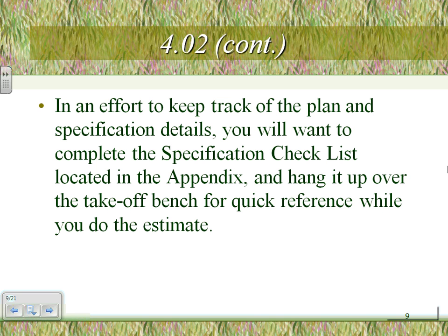Then you pick up the phone, call Michelle Cooley Erickson, and call Nick, the engineer on the project, and say, Nick, could you please clarify 1, 2, 3, 4, 5 about the specs and the blueprints? You look like you're a professional. The best way of using your time, instead of every time you read something, pick up the phone and call Nick. The first time, second time, third time, the fourth time, I bet you he's not in the office. You don't want to disturb people. So summarize all your questions in one sheet. Call the engineers or the architect to get your answers. Make sense? No?